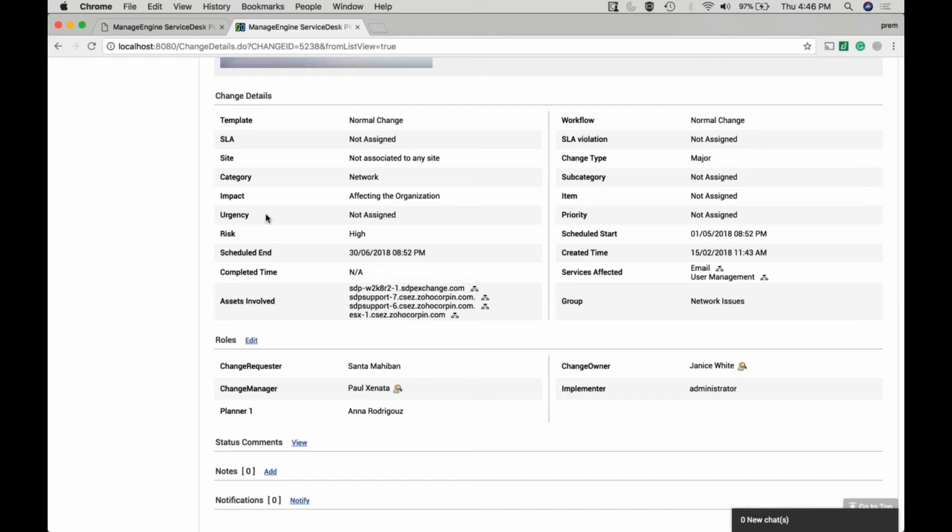So the business purpose varies, and based on the business purpose, the criticality of the asset also increases. So it is very much essential for us to understand the criticality and then record the impact before you unplug anything without approval, right? So that is the reason we always associate assets to the change. And when you associate assets, it's also essential to notify the change manager about the services that will be taken down during the execution of the change.